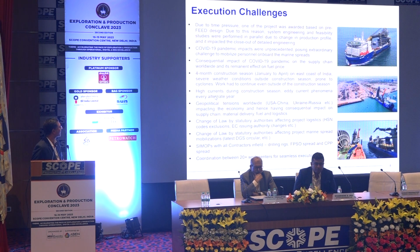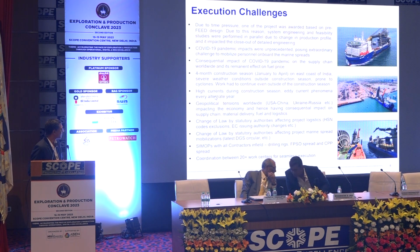Other things, like the Ukraine war, exacerbated some of the problems we had. But the other key thing, just one last thing I want to touch upon, is the change of law. As a contractor, we only go with the law that we know on the day the contract is signed, but whether we like it or not, sometimes changes in law are thrust upon the contractor. That makes it very, very difficult for the contractor to go back and comply with the new laws, and that is going to involve impact to the cost and schedule. So that is another key thing I wanted to touch upon as part of this slide.